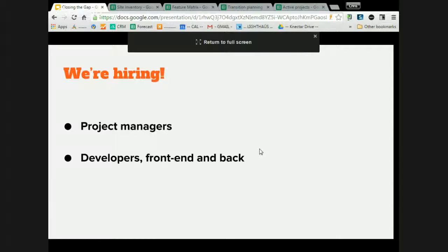And it's a little bit of a hard sell. It takes a lot of effort to get an RFP out the door. It's a bureaucratic exercise. It's a political exercise to get an RFP out the door. So if you're going to say, thank you for your RFP, we'd love to be participating, how about a discovery phase? They're like, whoa, it took us a year to get this thing. And now you're telling us it's not good enough? Sorry, it needs some work. We can't estimate based on this level of unknown. It's too much risk. Well, that's a question for the business.